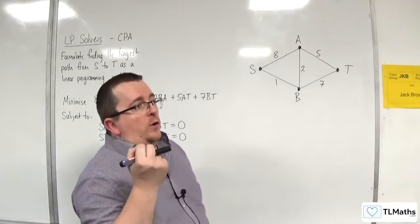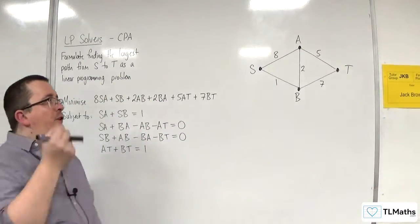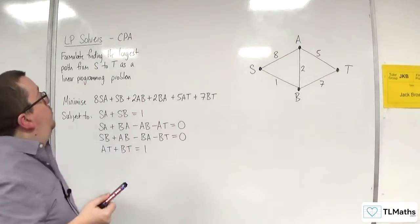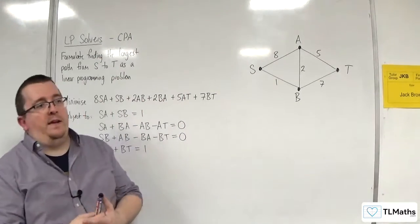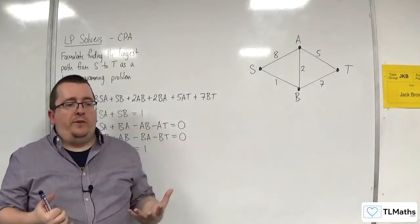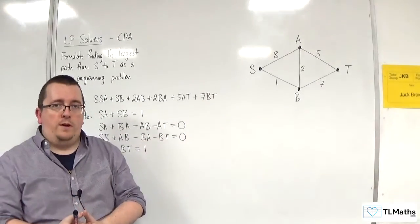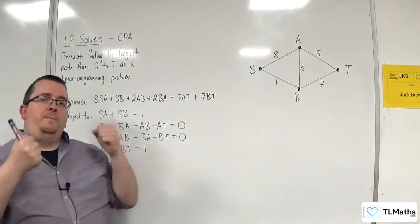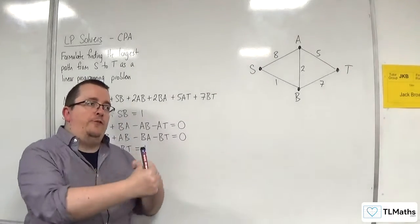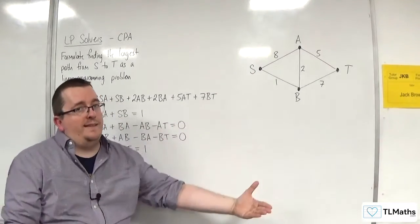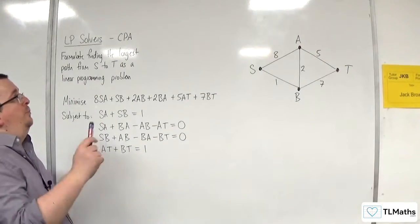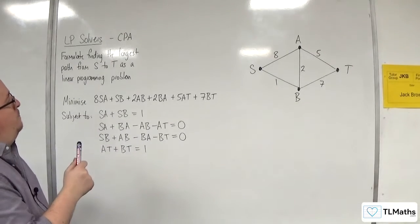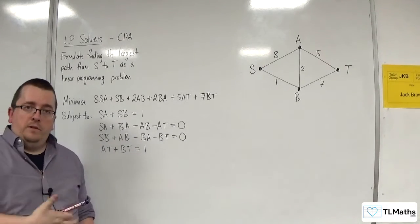In this video, I want to formulate a linear programming problem that will find the longest path from S to T. The reason I've put CPA — critical path analysis — up there is because when you're doing CPA and want to find the critical path through your network, that is essentially finding the longest path through the network, because you've got to allow for all the jobs to be completed before you can get to the end. So finding the longest path and CPA are synonymous. You can actually program an LP solver for CPA using the longest path.